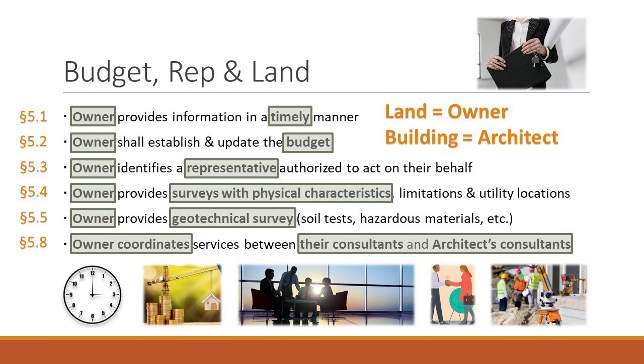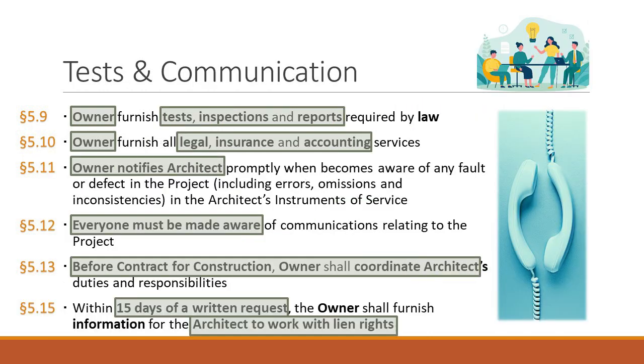contractor. Just as my own sense, I often change the contract to put the responsibility on the general contractor, and when we get to the 201, I'll talk about that more in detail. So sometimes I'll modify some of these provisions to place the responsibility back on the prime. Here, most of the time I don't put it on the architect, but I will do it on the contractor. Okay, next.